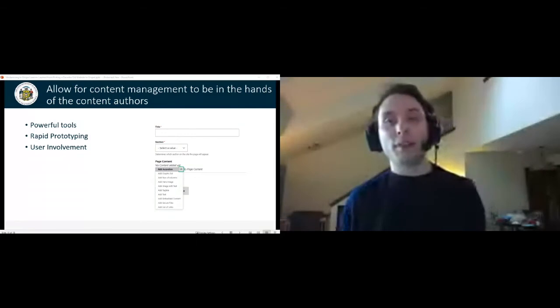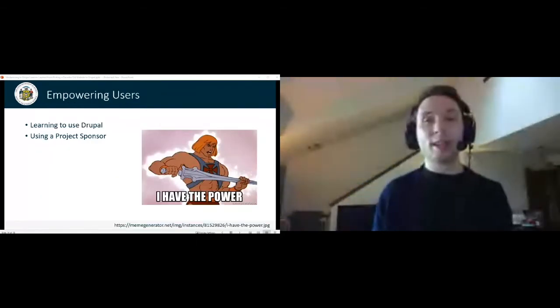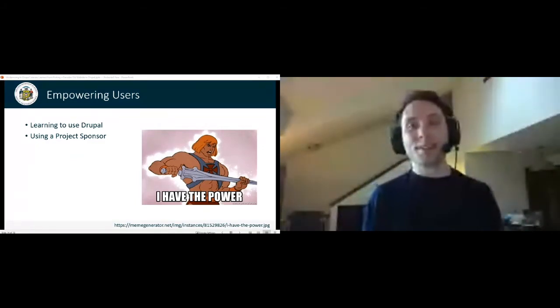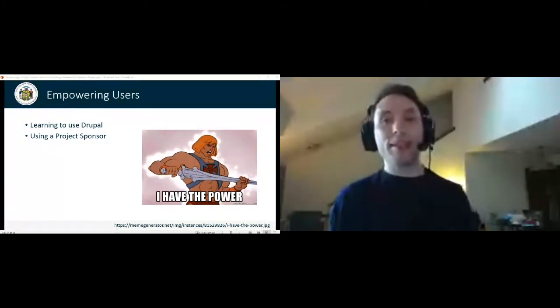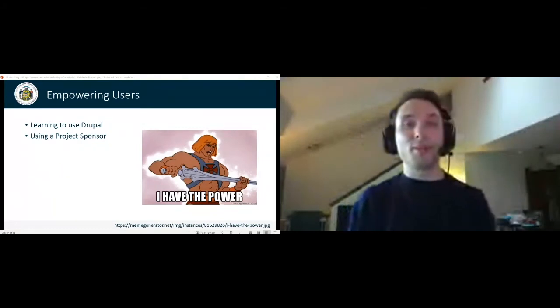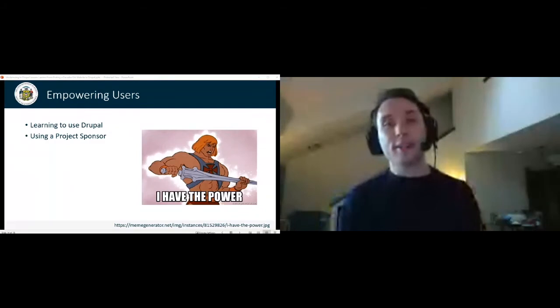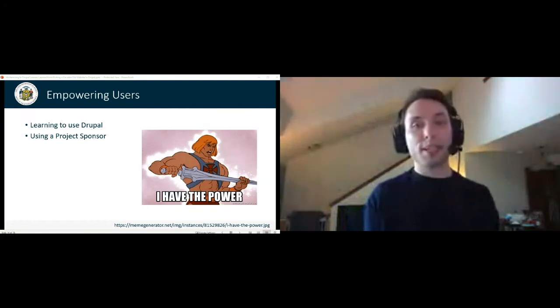It also took a while for our content authors to learn how to build the pages themselves, even though they were sitting in on the demos. The demos had made the content authoring process look easy. So one thing to watch the process, it's another thing to do it yourself. So to get them comfortable using Drupal, we held training sessions. And the training sessions gave them a place to work through their problems and have their questions answered. And it was the key to our success. We would hold bi-weekly meetings throughout the duration of the project, and it really empowered our users to be able to add the content and use Drupal themselves.